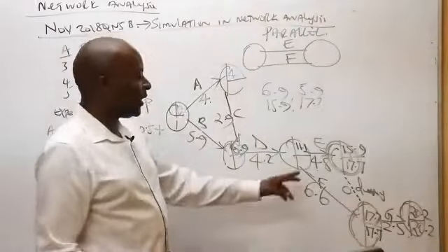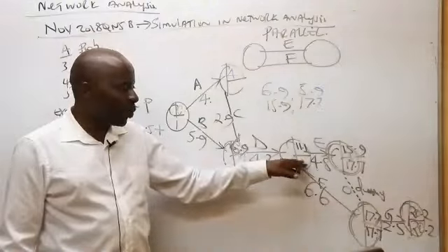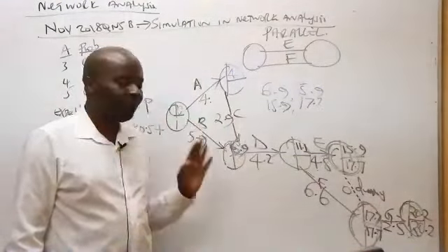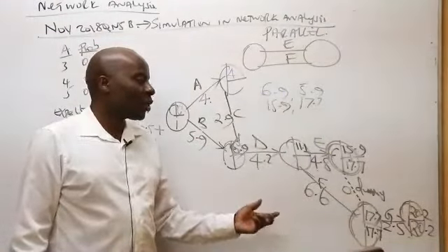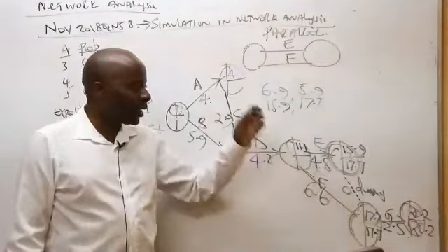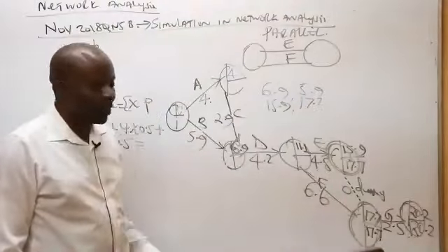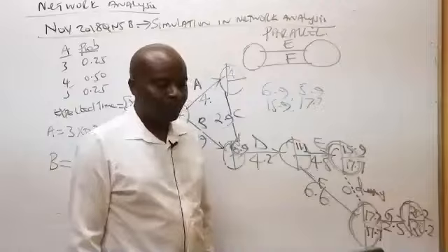Ladies and gentlemen, look at this. This one here is a funny one. Why? Because there are two arrows moving backwards into it. Two of them. I will not panic at all. I'll just calculate their two-time differences. So I'll have here 17.7 minus 4.8. Somebody has to give me this figure. Somebody using your calculator, what is 17.7 minus 4.8?